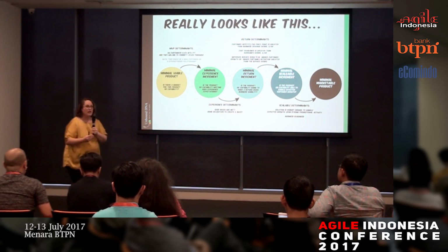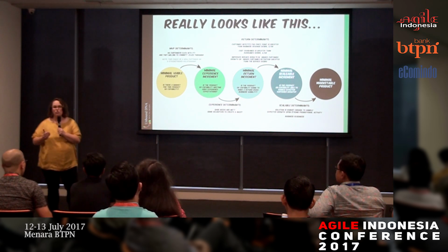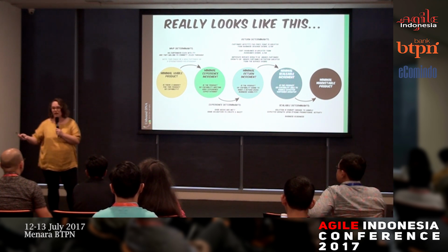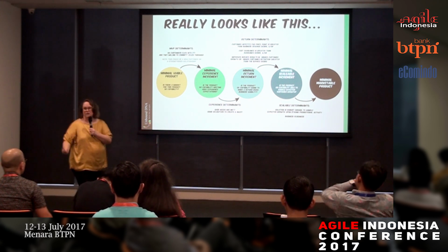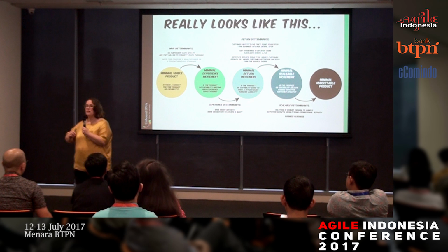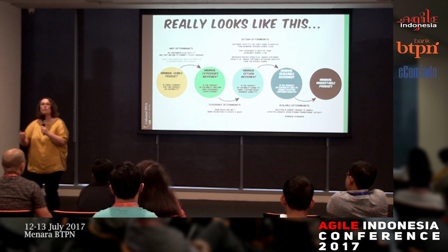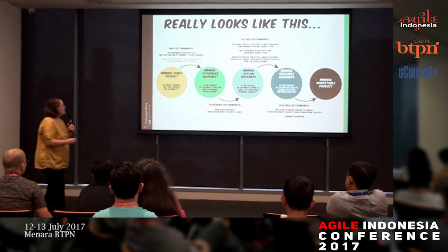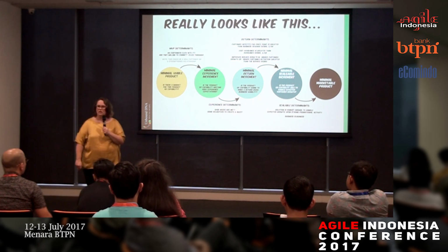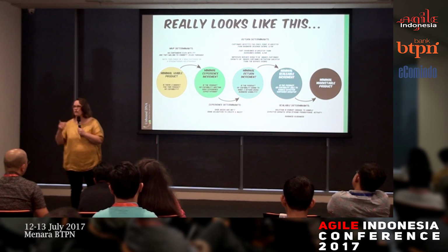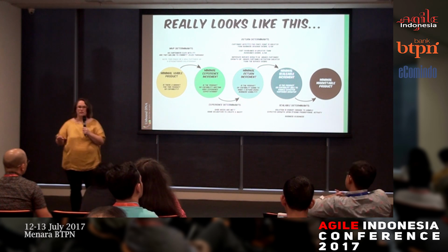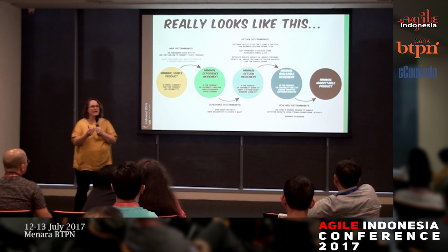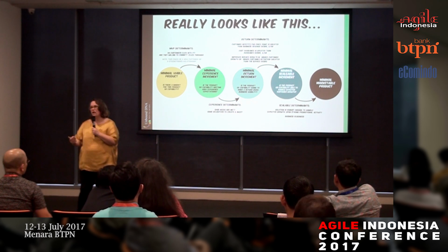So what you need to do, especially if your reputational risk exists, like if you're a bank, you don't want to put your name out there on a product, for example, that you put this minimal viable product out there to 10 customers, 10 safe customers, maybe even 100. Try internal customers yourselves first. Then you do a minimal experience increment, because the minimal viable product probably doesn't have the full experience that a customer actually wants. Then you do a minimal return of investment. So now that we know that we're meeting our customers' needs, how are we going to make money off this product?